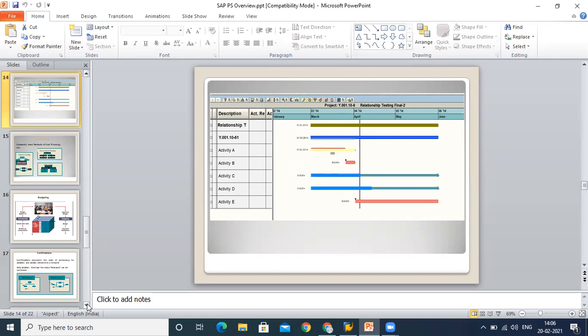We not only confirm the time, but we also confirm the resources which we have used. Let's say as per planning I need four labor hours, but in the actual situation I consumed five labor hours. That detail can also be mentioned in our confirmation.